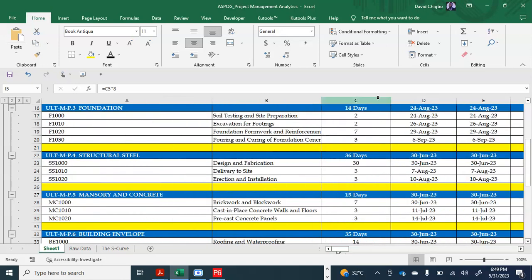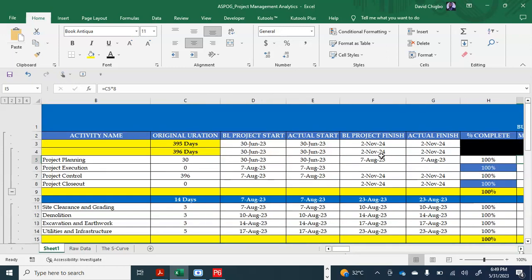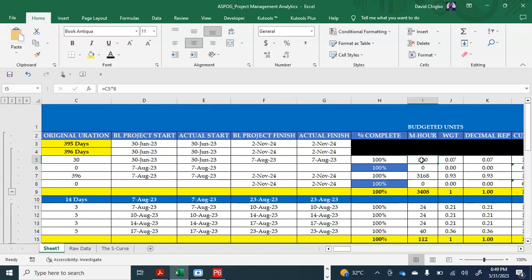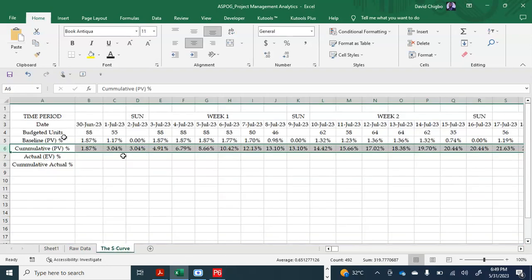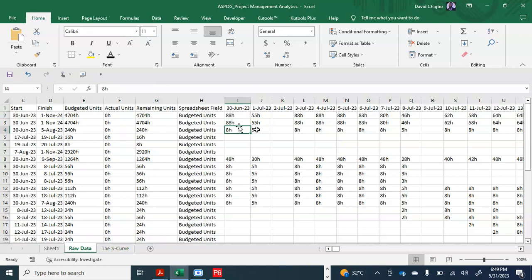Those man hours, I multiplied. Look at it here. In the man hour I multiply by 8. I multiply by 8 to get this particular. Look at the 8 hours times these 3 days. Do you understand? So I multiply by eight. It's still the same equivalent to what we have here, because 8 hours, then cumulatively, 8 hours each day. This is what we have here. The reason why we have 5 hours here is because it's on Saturday. You know, Saturday we still work 5 hours.